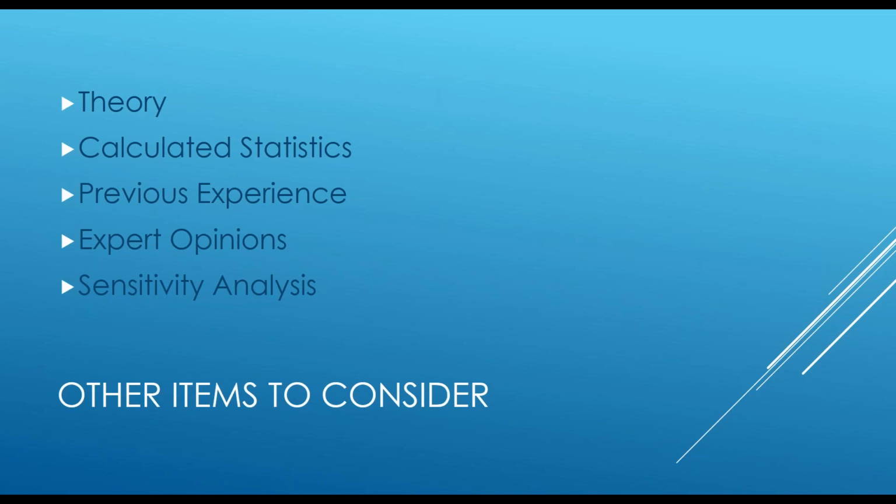And then also sensitivity analysis. If you have a model that has thousands of inputs, are you going to want to go through this process for every single input trying to figure out what is the best distribution? No, you're not going to want to do that. What you could do at that point is open up TopRank, choose your output, auto vary inputs, do a what-if analysis, see what your key inputs are, and then only focus on choosing the most correct distribution, or the least wonky distribution, for those key drivers that are your key inputs that drive that output.